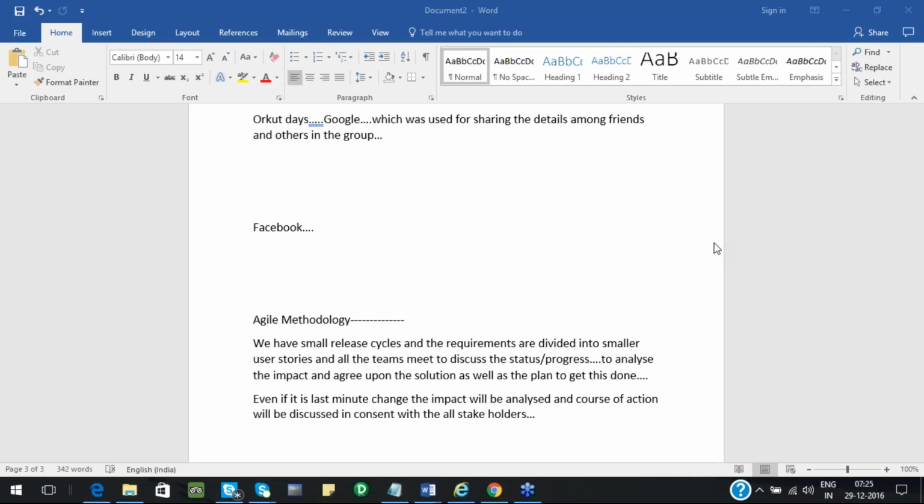Obviously there are multiple teams involved: database, data warehouse, UI, QA, deployment team. There are almost 6,000 to 7,000 deployments that happen in a day in Amazon, which means every minute you have at least 3 to 4 deployments happening in parallel. In that kind of environment, developers, testers and deployment have to do active collaboration, so there they will use Agile methodology. But if you take any banking project where the product release will happen every 6 months, you don't need an Agile methodology. So it depends on the type of process we are following or the type of project we are seeing.